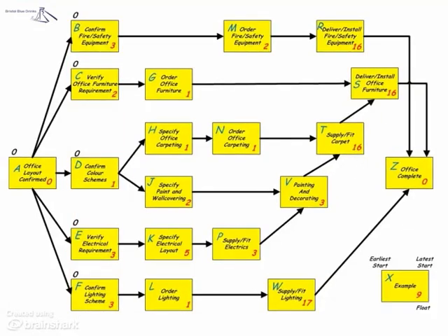Because I was going to be sharing this plan with other people, I decided I would photograph the flip chart when it was finished. I put a key on the bottom so people could understand the numbers. I was going to calculate the earliest start and latest start for each activity, and also how much float or slack I had. That means the amount of time an activity will slip without affecting the project progress. This would also help me later in identifying which activities must not slip and were therefore what is known as critical. This is a pretty laborious process and not one where you want to be disturbed halfway through.